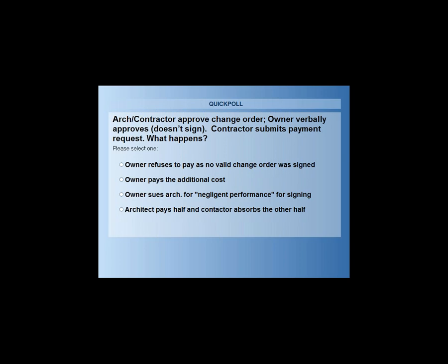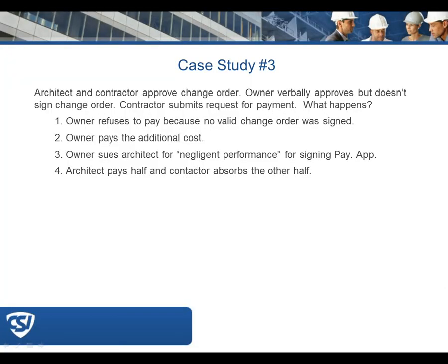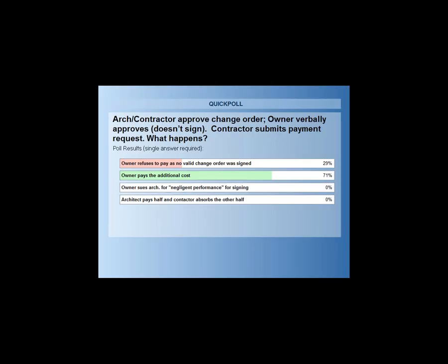One of the things, Doug, I'll just add while everyone's making their selection, is that it would be interesting to know the number of times that we get ourselves into our own trouble by not following the documents that we prepare. For example, we will say to the contractor, in this scenario, you cannot get paid for change order work unless it has been authorized, and it cannot show up on your pay application until it is official.